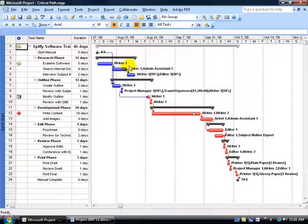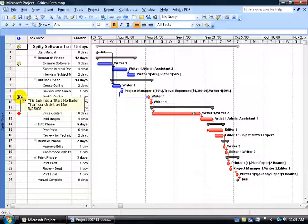We already talked about the first non-critical path — here's the second one. The first task here starts on a given date and doesn't go beyond October 6th. But its successor finishes on October 12th, so it could finish later and still be fine. Up until we get to the 'Modify Outline' task, which begins the critical path and has a constraint on it — this task can start no earlier than August the 25th.